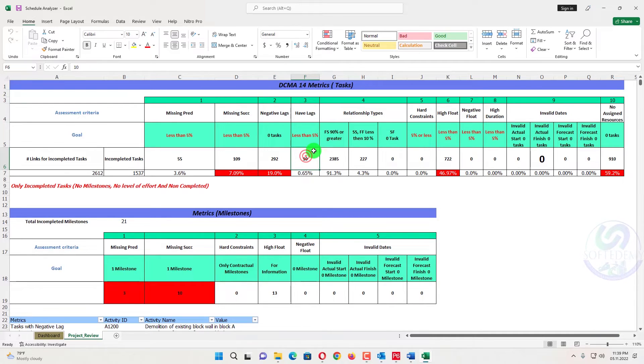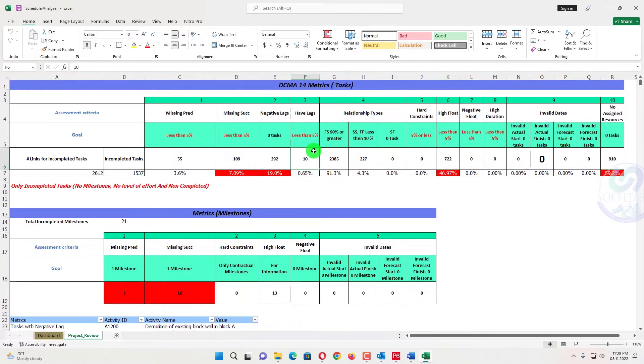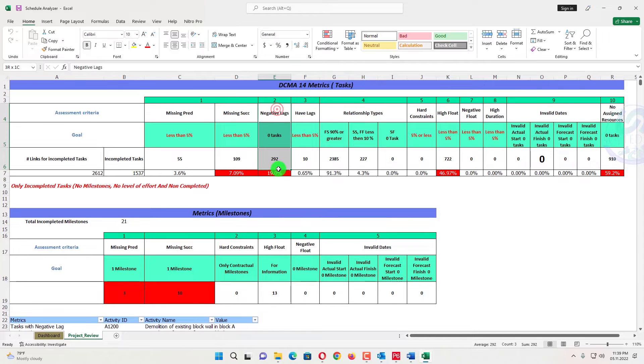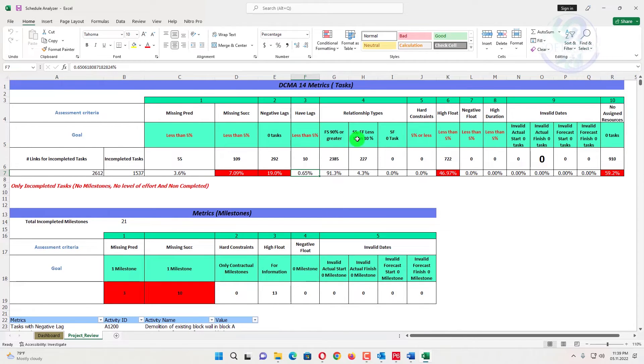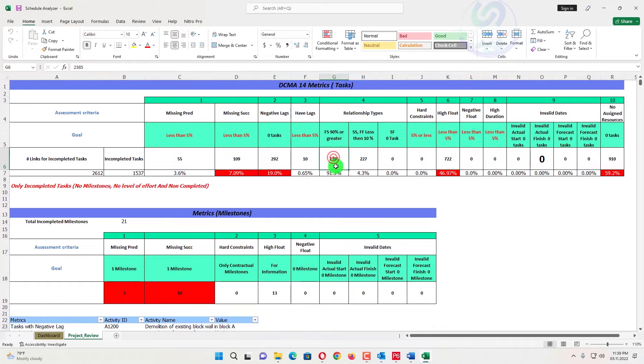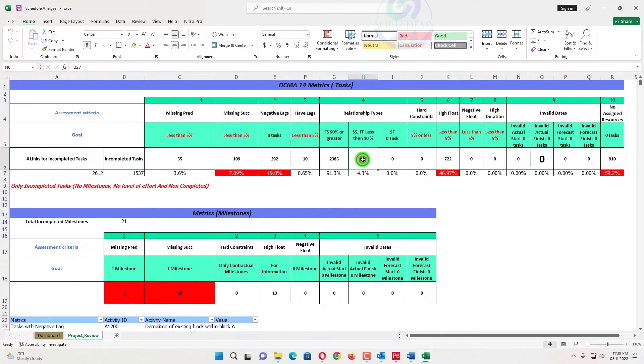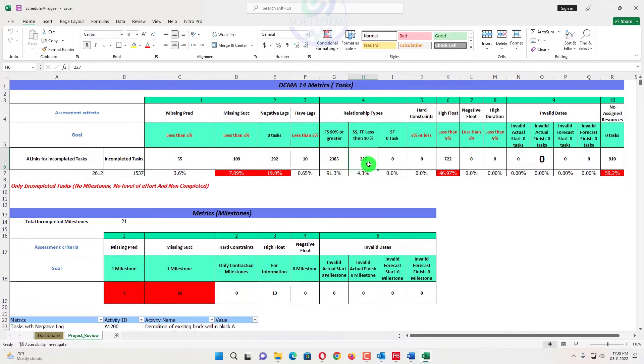Having lag, the having lag should be 5% of the activities. So the 10 activities having lag, that one negative lags are leads. So it's 0.65%. It's under the control of DCMA. Also finish to start relationship should be 90%, and it's also 91%. That's good. And that should be start to start and finish to finish should be 10%. That's under control.